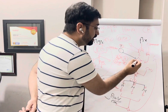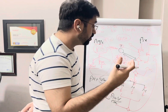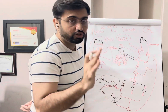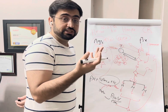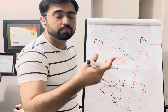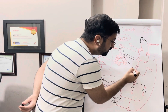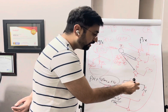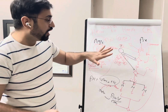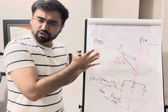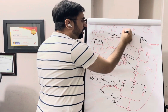When a change comes from the customer, the PM evaluates it on scope, schedule, and cost, then tells the customer: because of this change, cost will increase by this much, scope will increase by this much — do you still want to proceed? The customer analyzes the impact themselves and, if they say go ahead, the PM sends the detailed analysis to the Change Control Board and the same procedure is followed.